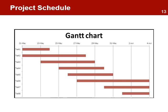The project schedule is represented in a Gantt chart that shows when each activity starts, how long it lasts, and when it will be completed. This is usually represented in the form of a bar chart, which sets out the sequence of activities and links them to critical events or milestones. This chart is a graphical representation of the time required to complete each activity and the time to complete the whole project. The Gantt chart is simple, easy to read, and can be used to track progress against time. The chart uses the activities from the work breakdown structure as headings for each row.